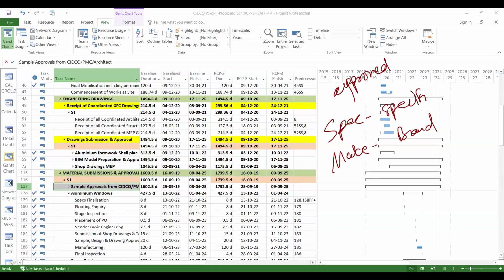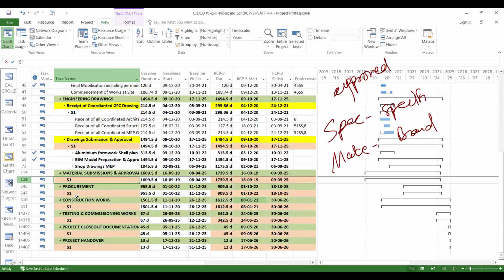You have considered vitrified tile and published that we are going to install vitrified tile in our project, and later on you install porcelain tile, then the end user will not be happy with your decision. That may go into the RERA court and all. So that is why this needs to be decided earlier. I hope you understand all these phases. Then after procurement comes the construction work.